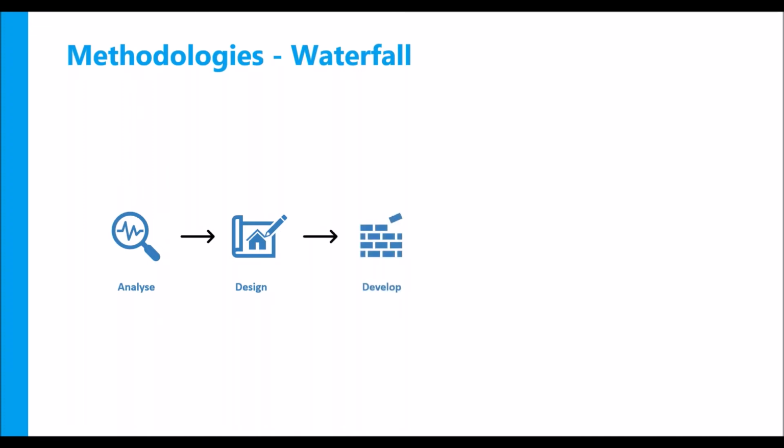If I look at a typical software application as an example, so if I have to run it in the waterfall model, I would typically start with analyzing the project, right? I will look at requirements. I'll try to freeze the requirements with the project sponsors and other stakeholders. And then sequentially, I'll start designing for the project, right? So once I freeze the requirements, I design for the project before I start coding.